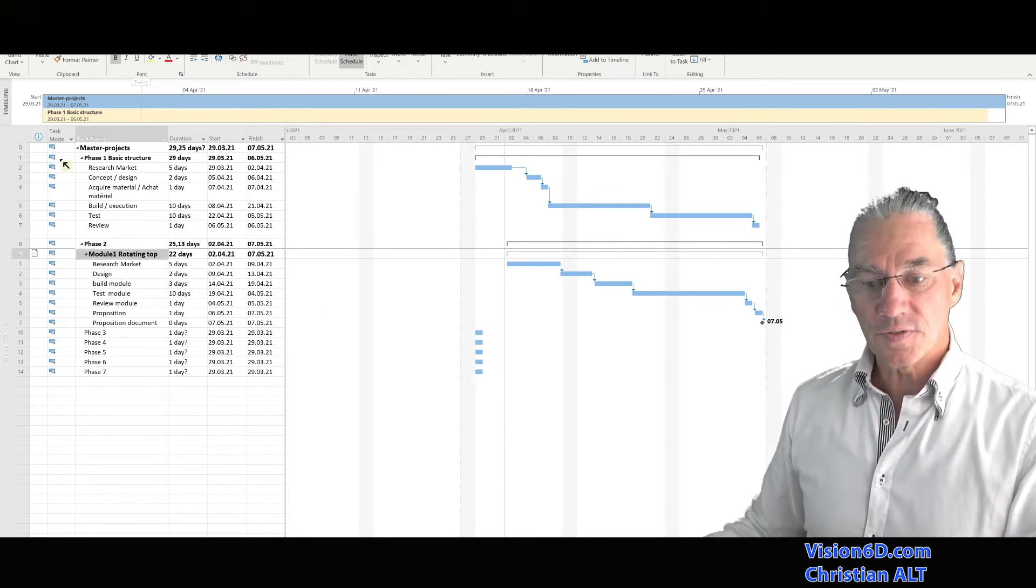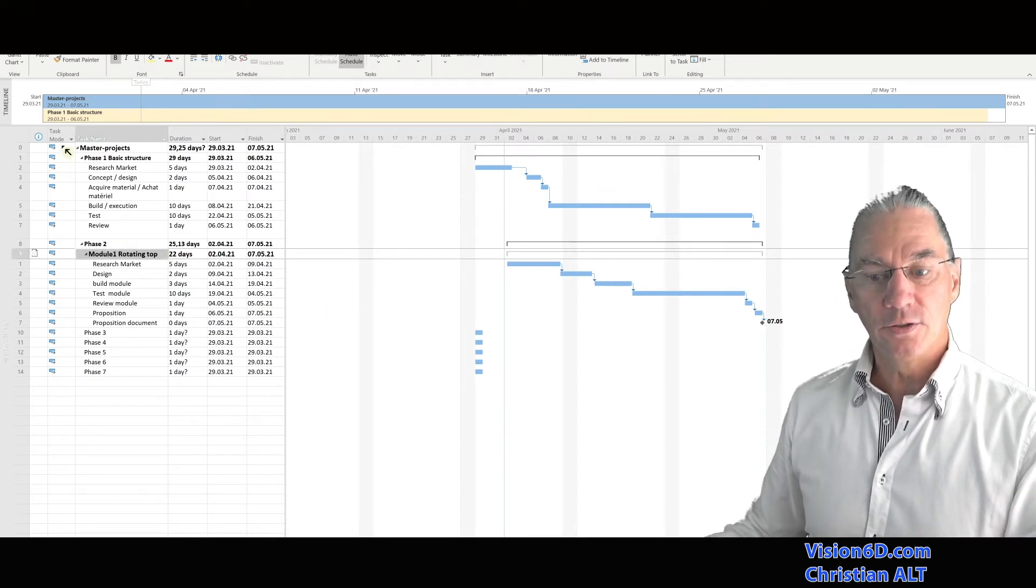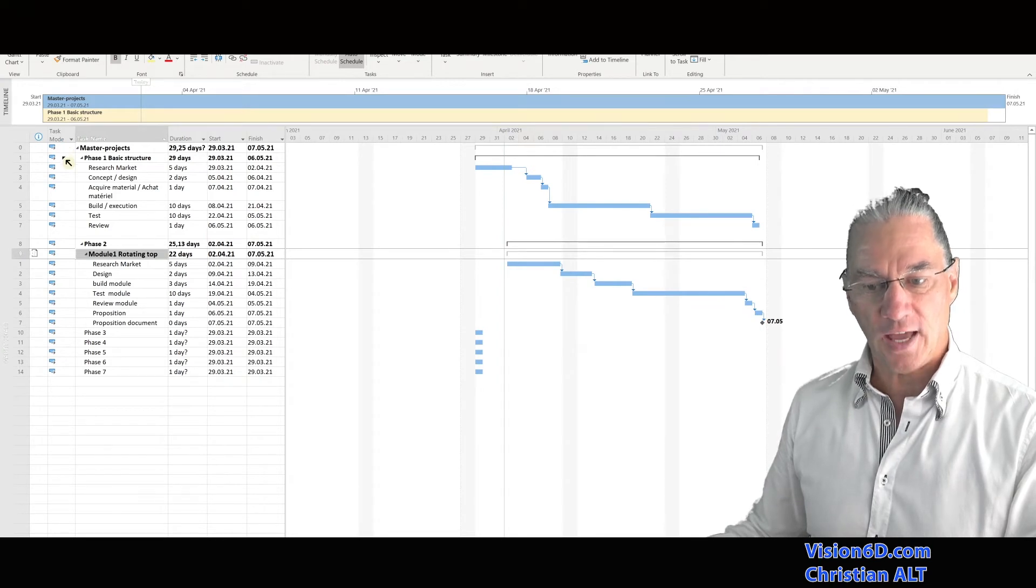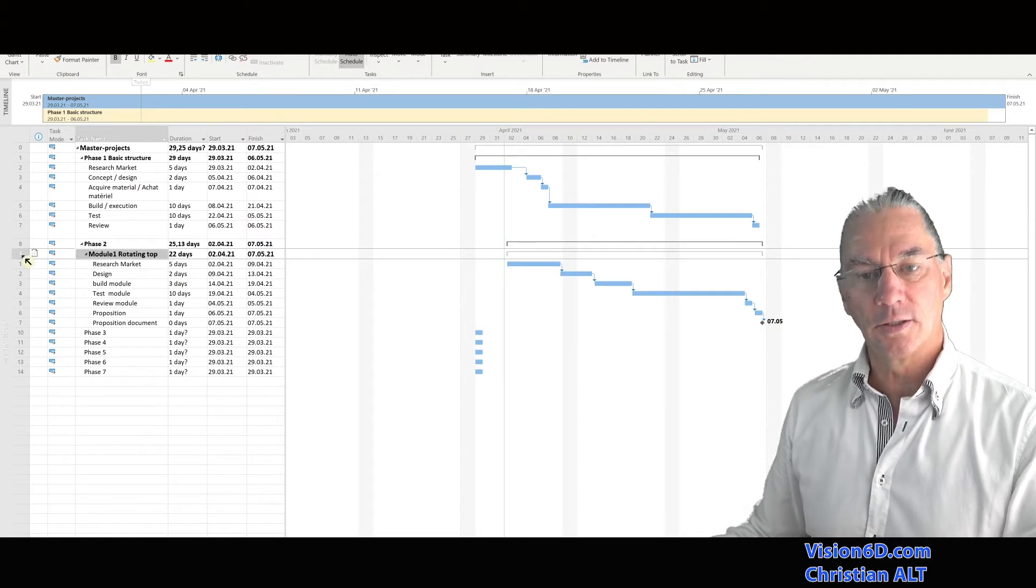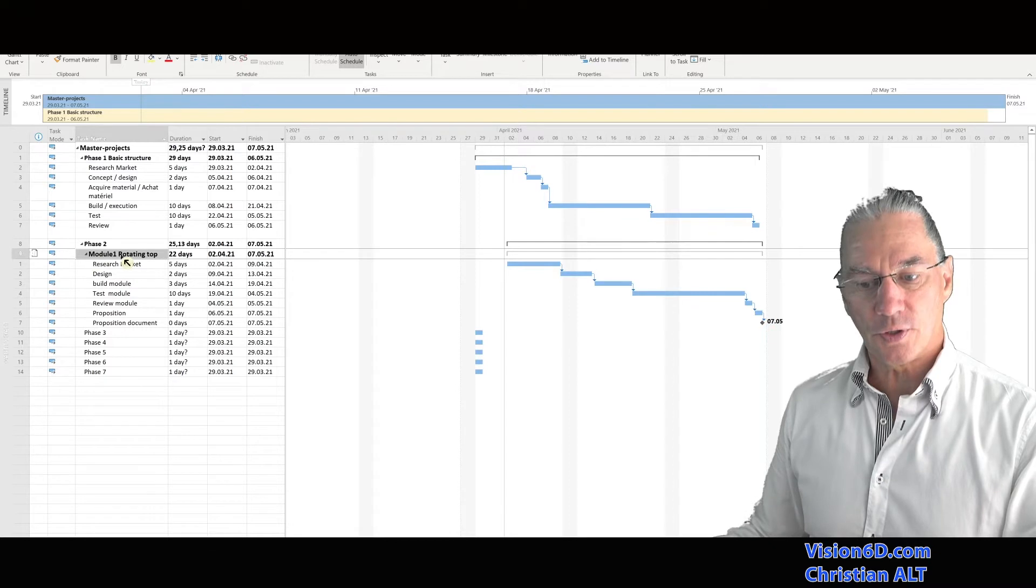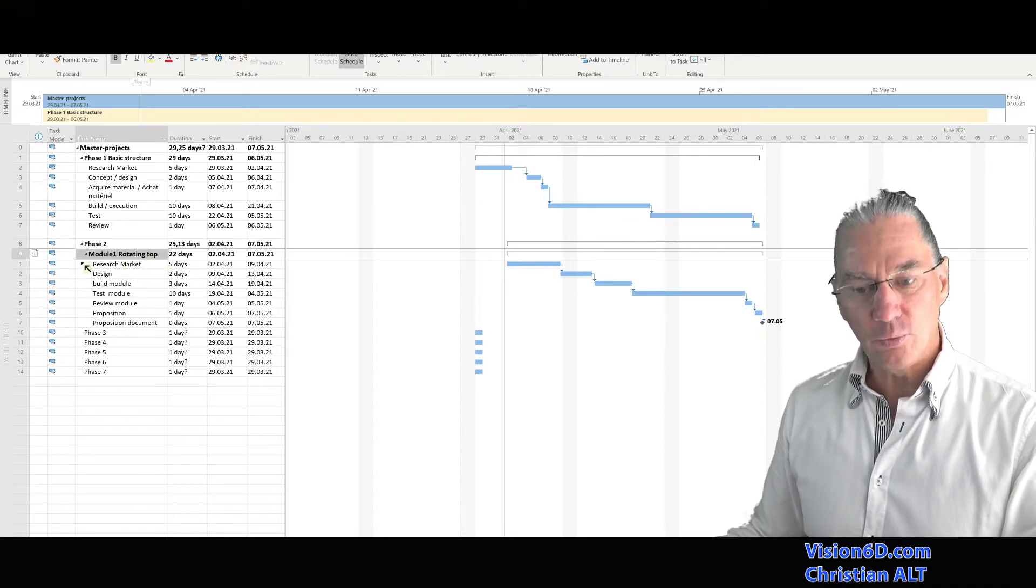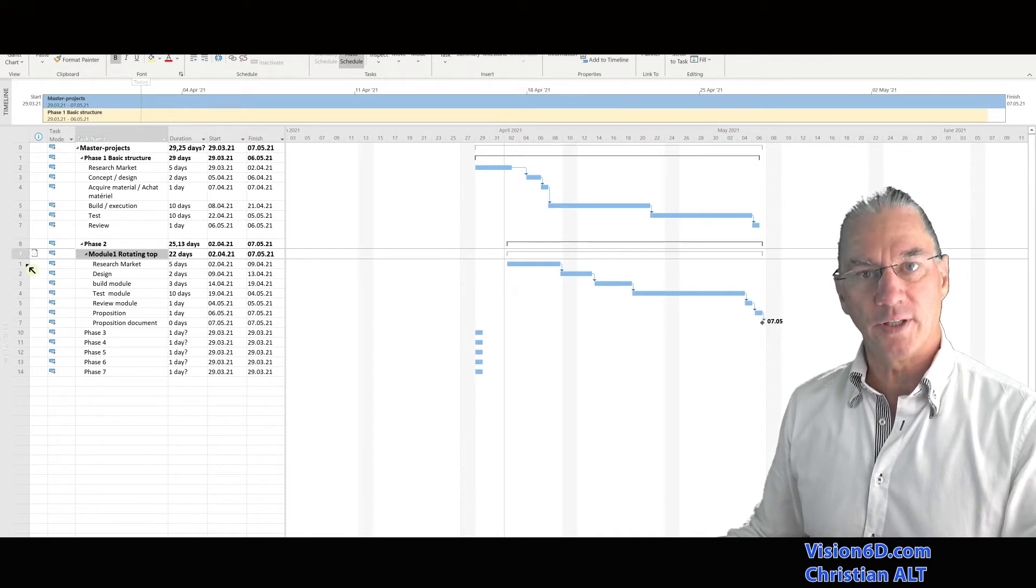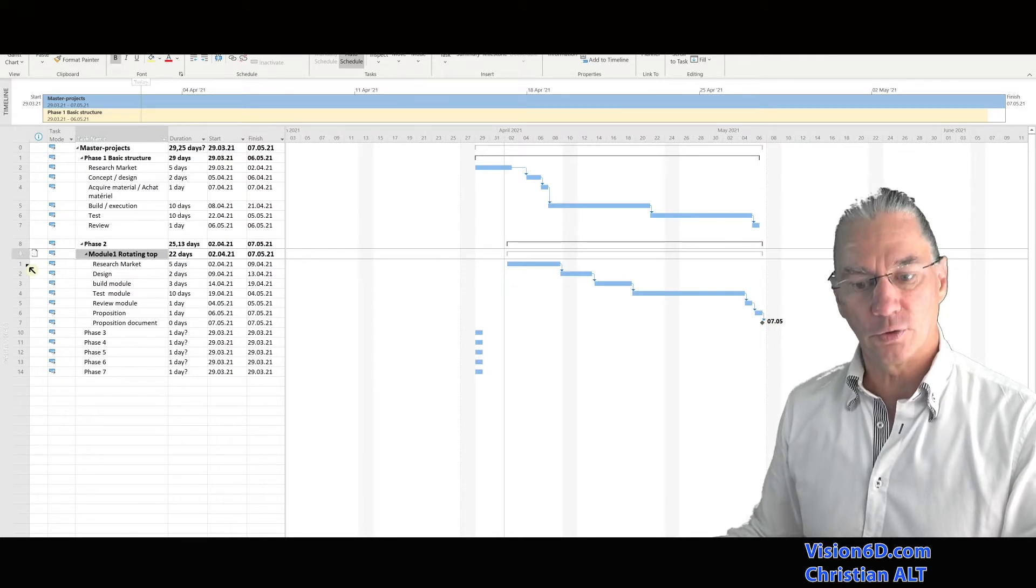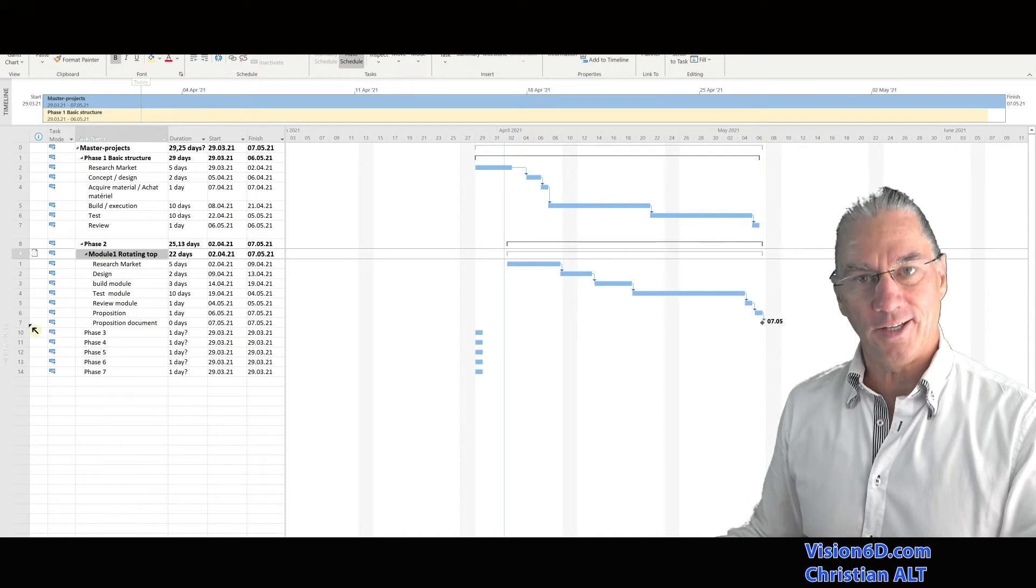We notice that the numbering into the master project for each task which is inserted is going continuously till the nine here. This is to start with the module one file. And we see that from this point, it starts over with the numbering extracted from the external file.